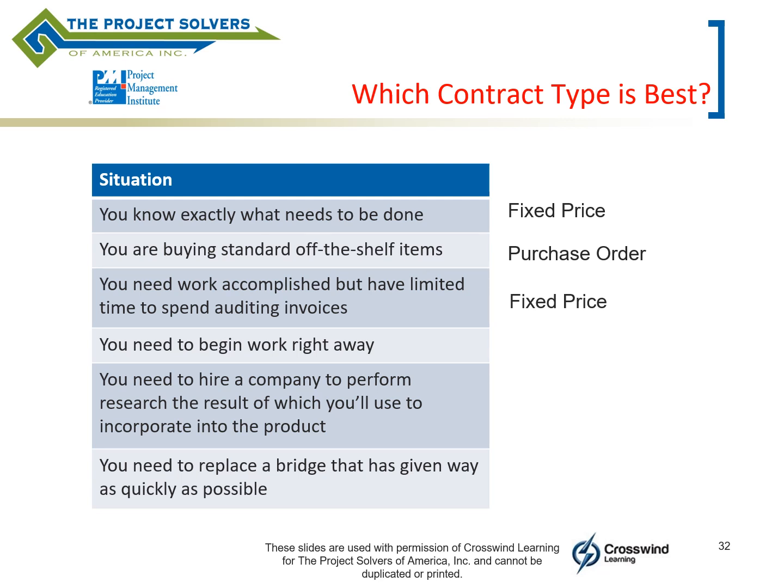What if you need to begin work right away? What would be the fastest type of contract to get into? So hopefully you thought of time and materials. Generally, it is a pretty quick type of contract to enter into.